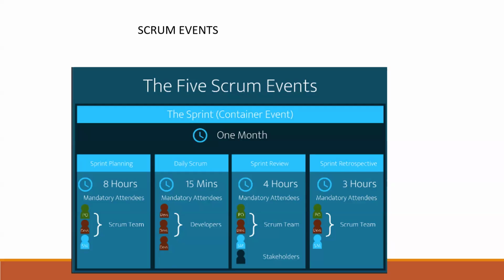If it is a 2 week sprint, let us say from this Monday to the next Monday, and then after that next Monday. 2 weeks, I mean the first week, second week. So in 14 days, you will have 2 weekends, right? So Saturday, Sunday, it's going to be 14 minus 4, 10 days. So altogether, your sprint will be for 10 days in a 2 week sprint.